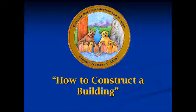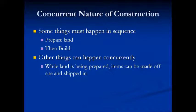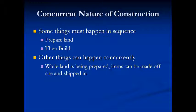In looking at how we construct a building, we'll get into the various details eventually, but I want to first look at the concurrent nature of construction. Whenever you're building something, the various types of things that can happen need to be installed — in some cases sequentially — but there are things that can happen at roughly the same time by different people in order to eventually get their place into the whole building construction.